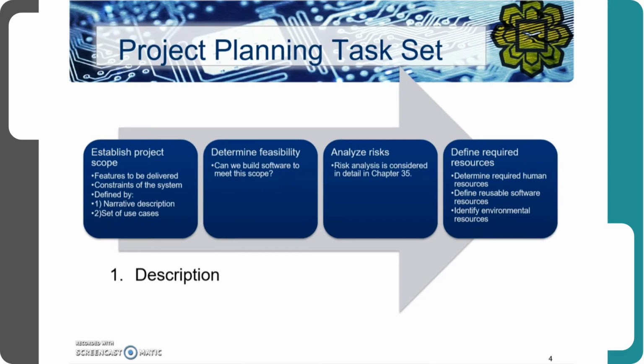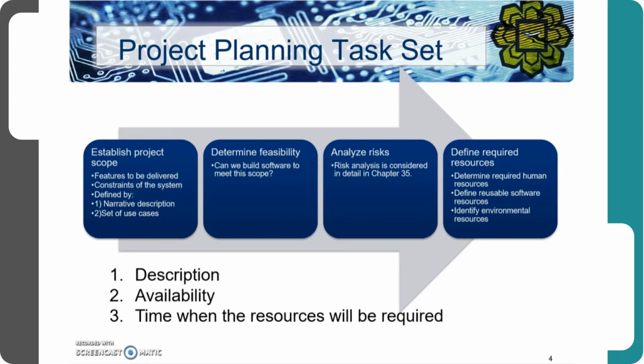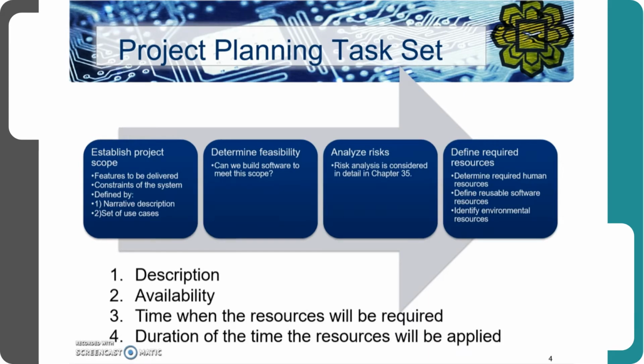When we identify the resources, we need to define the description of the resources, the availability of the resources, the time when the resources will be required, and the duration of the time the resources will be applied in the project.